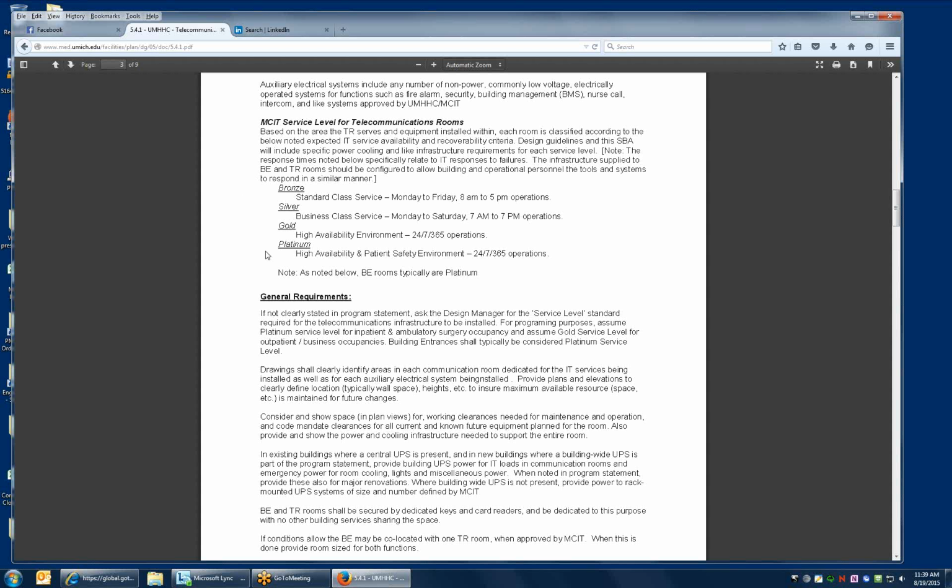And so that was kind of a change that the campus may or may not have. At the Children's and Women's Hospital, they wanted to put redundant switches in every closet. So that doubled the power, doubled the fiber, stuff like that. So we can't have a cookie cutter design of 12 single, 12 multi, and 130 amp and so forth. Like Josh says, each building design is dependent on what the standard's going to be. For example, a remote office site to networking is silver or bronze.